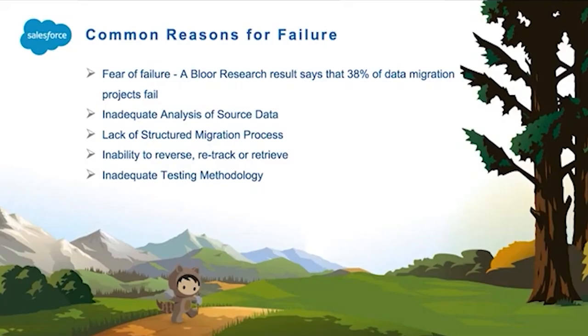If they just go ahead and do the data migration, many may do it directly in production. That's again against best practice, but due to a time crunch or various other reasons, they may perform those activities directly in production without any backup options in place. That is another common reason for failure. The last one is an inadequate testing methodology. The team may believe the data migration went through successfully, and after a few days or weeks down the line, they start getting more and more issues from business users. Those are the common reasons for data migration failures.